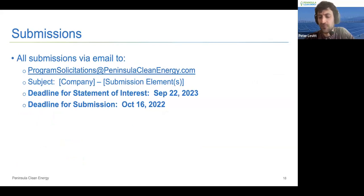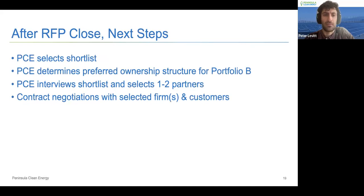The deadline, again, for the statements of interest and qualification is September 22nd, and the deadline for submitting your proposal is October 16th. Once we get proposals, PCE will select a shortlist. We will, based off the proposals we see, determine the preferred ownership structure for Portfolio B. So again, that will either look like PCE owning and financing the equipment ourselves, or more likely pursuing a third-party financial partnership with a master PPA provider.